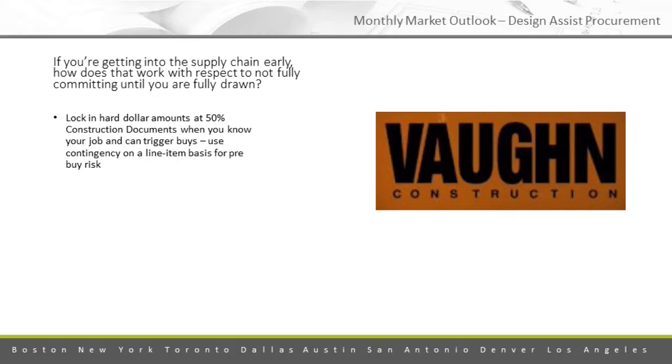Yeah, and we're doing the same thing with MEP. I mean, similar type situation. I know we as a company have worked on large projects where we've done pre-buy, and we're about to get into that on a project as it relates to MEP with commodity materials and trying to lock in, one, reduce any increases, but then also what we've all been facing lately, just to make sure we have what we need in time. And I'll go back to the drywall example to be another reason why we're doing this early procurement of a drywall sub on a project, is with the lead times with cold form framing right now. I mean, it's causing us to think outside the box and do things, and we want to be able to do this while not adding any more additional cost to the job, especially considering what's going on with the market conditions.